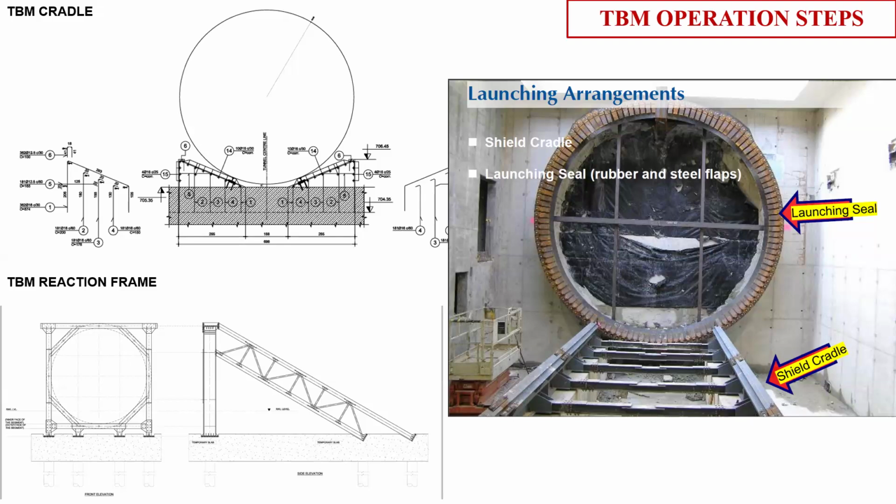It depends on your alignment, your purpose, and your logistics, because it's a completely operational part. You also need to see what your timeline and baseline schedule are. If you are preparing the shaft, the shaft excavation will take a long time, because you have to excavate, then support the shaft, and only once the shaft is ready can you start operation.